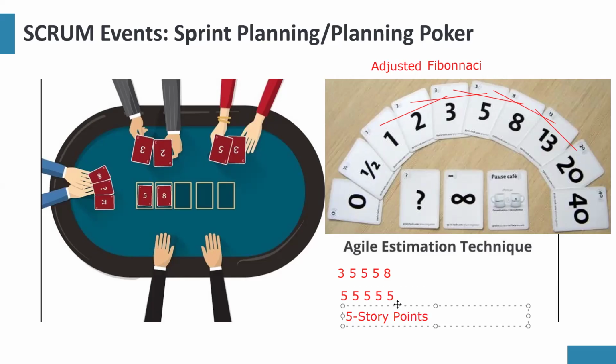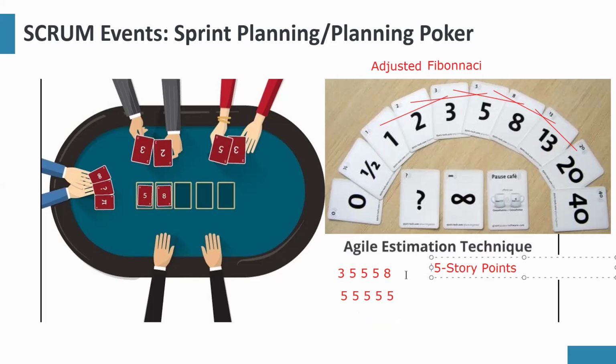So this is how developers estimate. They'll use cards, then they'll ask themselves questions. Why do you think this thing is a 3? Then one will say, the time I did this thing in another project, it took me a few steps because I knew a particular technique, and he might share it with them, right? The one that chose 8 says, the last time I tried it, you guys ever experienced this issue before?